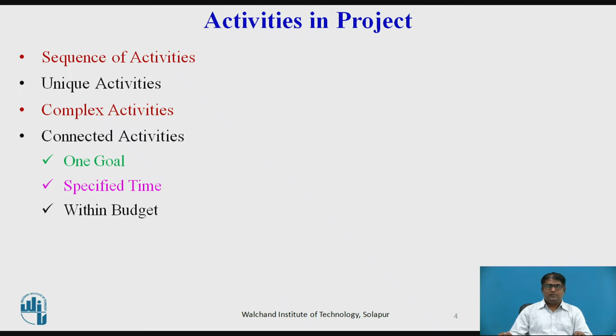You could have a list of unconnected activities that must all be completed in order to complete the project. For example, consider painting the interior rooms of a house. With some exceptions, the rooms can be painted in any order. The interior of a house is not completely painted until all its rooms have been painted, but they can be painted in any order.